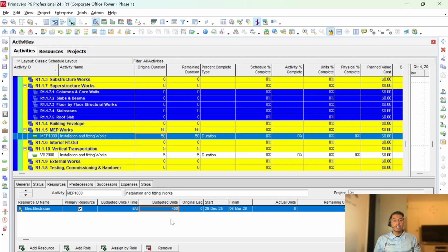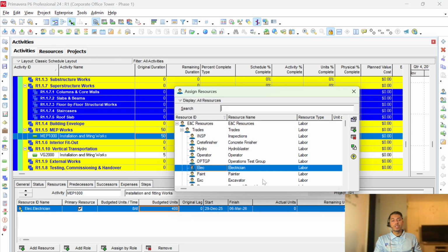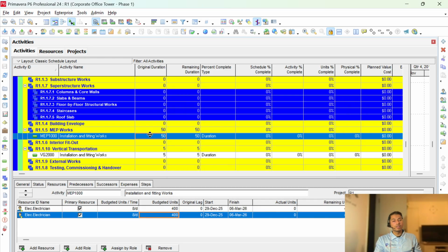In an ideal real world, if we introduce more resources, we can complete the task early. But if we use fixed duration and units, even if we introduce more resources, neither our duration nor our units will vary. So it is not a true situation. On introducing more resources, our duration needs to come down. We want it to come down. Our task needs to be divided between our resources.